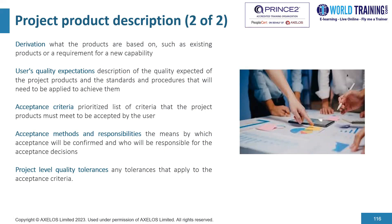The project product description also includes acceptance criteria — a prioritized list of criteria that the project products must meet to be accepted by the user. There is a section on acceptance methods and responsibilities, covering the means by which acceptance will be confirmed and who will be responsible for the acceptance decisions. Finally, there is a section on project-level quality tolerances, where any tolerances that apply to the acceptance criteria are documented.